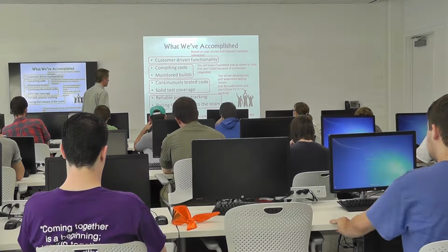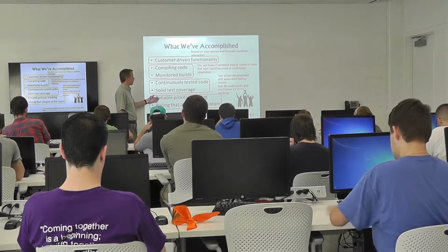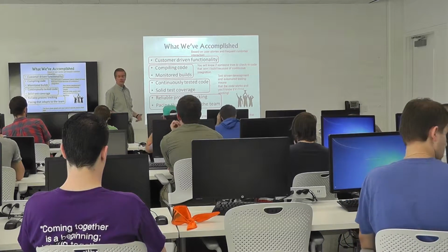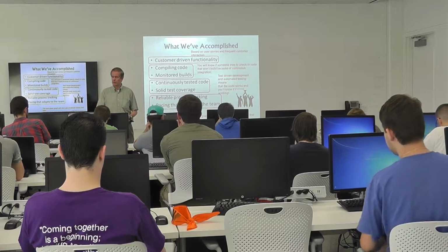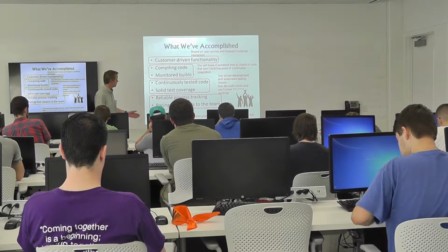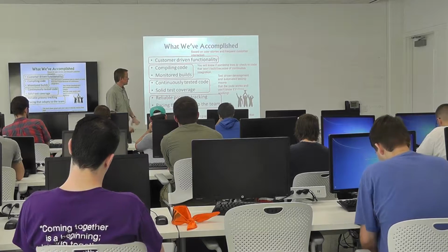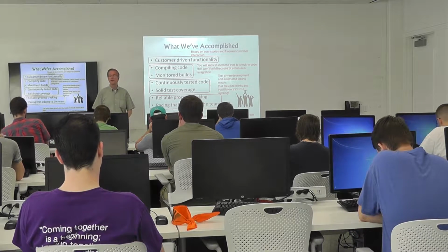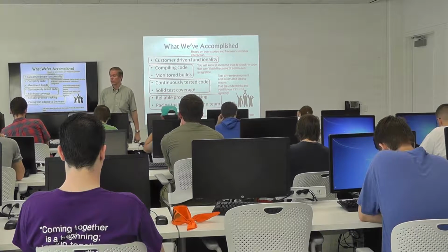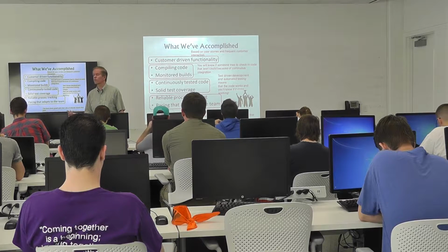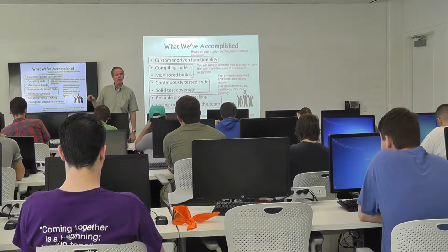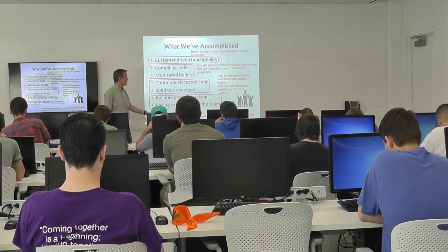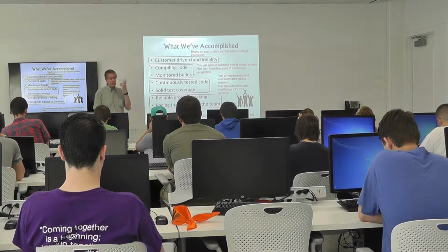And finally, we get down to reliable process tracking, and that's basically all the different things that we've been doing. It's repeatable, we can do it for each and every single iteration that we do. And we've got pacing that adapts to the team, which is a fancy way of saying that we have a velocity value that's calculated specifically for our team. We know how productive our team is, and so we're not going to ask them to do more than we believe that they can actually get done.